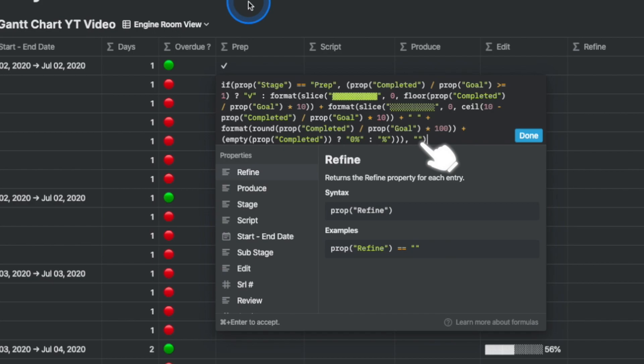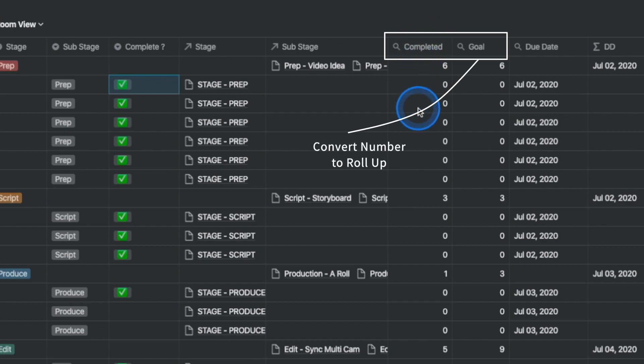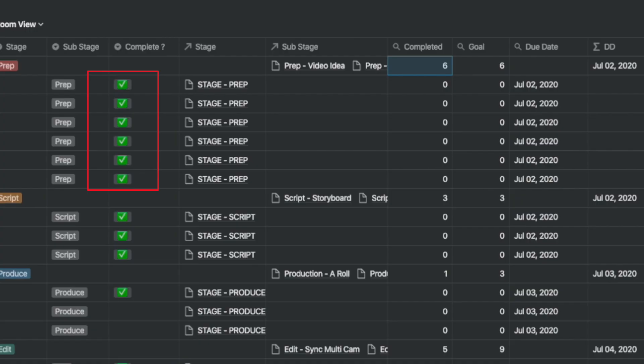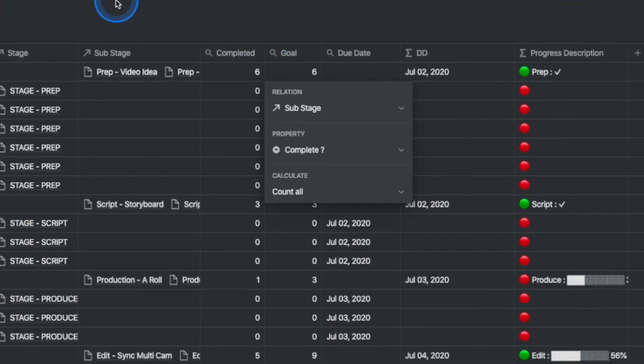Otherwise, it shows up as blank. Now that you've inserted all seven progress bar formulas, go back and change the completed and goal number properties into rollup columns and link them into this database. Take the activities and link them back to the relevant tasks, and use the count not empty for the complete tick box column. This will help you count the number of rows that have been ticked. Go to the goal rollup and do the same thing, but instead of count not empty, select count all.